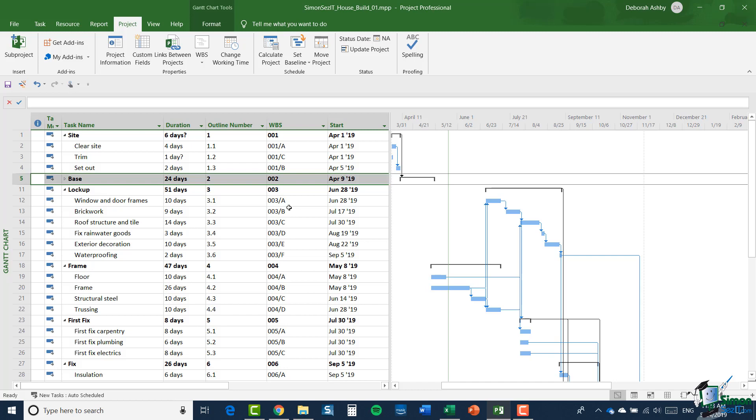WBS codes originated in government work. In fact, I believe they originate in the US military, possibly specifically the US Navy. And the idea was not only to be able to identify the task activities in a project using a coding system that was understood by everybody involved, but also to do things like relate WBS codes in one project to WBS codes in another project. And what generally happened back then was that when you're dealing with some kind of government project or military project, and this system soon spread pretty much around the world, you would be given WBS codes to use and you would need to set up your project schedule WBS codes so that your project conformed not only to government requirements but often to international standards in terms of identifying the elements within a project.